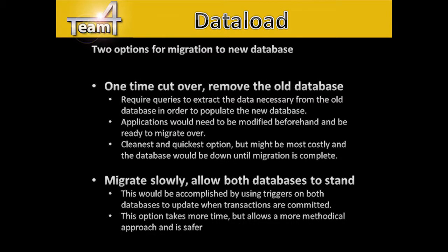In order to migrate over to the new database that we've designed, we have 2 options which require 2 different timeframes and levels of effort. The first option is to do a one-time cutover and remove the old database. This would require us to create some queries that would extract the data necessary from the old database and populate the new database. This option would be the cleanest and the quickest, but it might also be the most costly, as we would need to bring down the entire database for an undetermined amount of time.